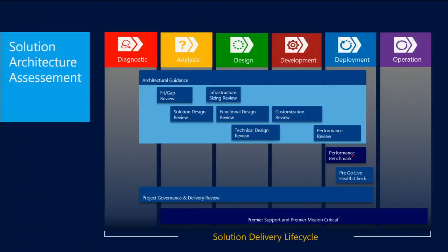There's a tool in there called the code analysis tool. And what our recommendation is that when you're doing custom development, you're embedding the code analysis tool into your best practices. That should be used at least on a, I'll say, periodic basis, anywhere from a couple weeks to maybe a month, but you shouldn't be going longer than that if you're going through the development.